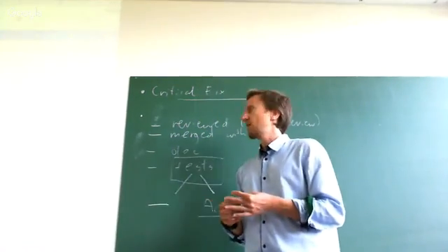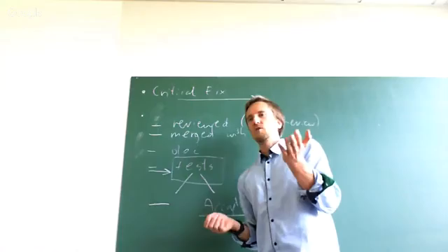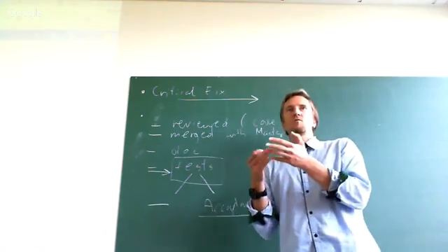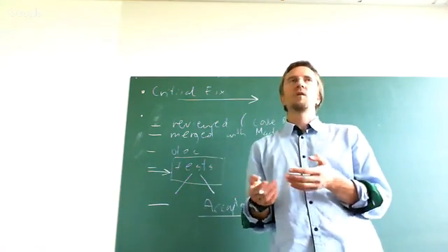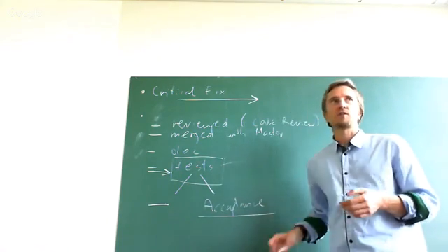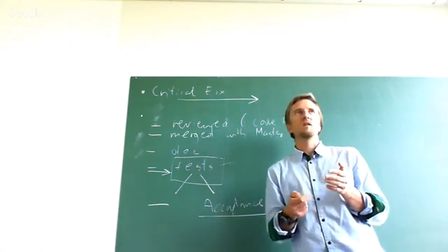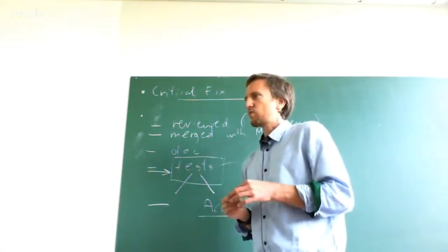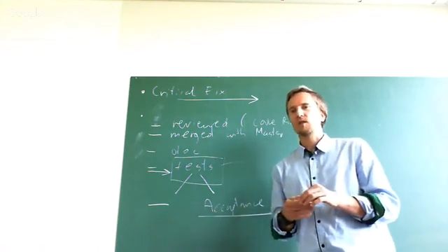One thing that we already covered is the definition of done, which does include testing, right? If you had an issue and you've achieved the definition of done, you close the issue, and then it turns out that you have to reopen it because there are still some things which we overlooked. It could be that your testing is not sufficiently detailed, and even though you've tested it, you missed some of the things. So you may need to add some extra testing to the procedure, or include different test data. So you designed the process slightly wrong.